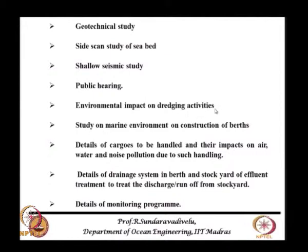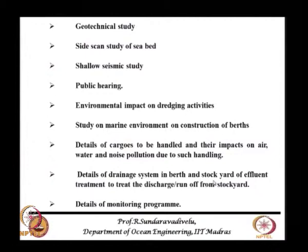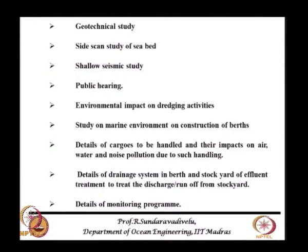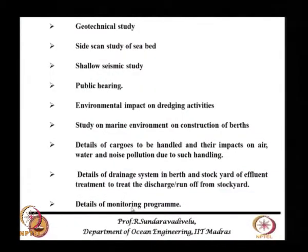We also have to study the environmental impact on dredging activities and construction of berths. Details of cargoes to be handled and their impacts on air, water, and noise pollution due to such handling must be provided. Details of drainage system in berths and stock yards, effluent treatment to treat discharge and runoff from the stock yard, and details of the monitoring program are required. There are two activities: one is the environmental impact assessment, another is the environmental management plan, and the third is the monitoring program, which is normally done once in six months.